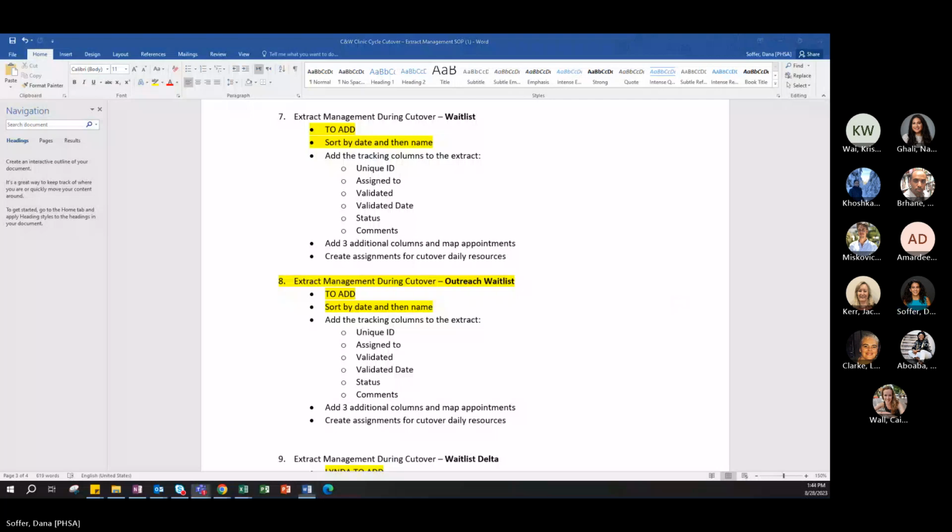Yeah, I was just going to say that in cycle 1, the waitlist extracts are really difficult to manage because there's no standard for how the clinics were using CW Cerner. To help mitigate that this time, we're starting to meet with the clinics in September to go through a waitlist cleanup SOP that has been created and tell them what we need them to do to their waitlists in CW Cerner, so that there's less work for you to do with the extracts, and so that people are using the columns in the same way. So hopefully that'll cut down the amount of analysis time required in the extracts.